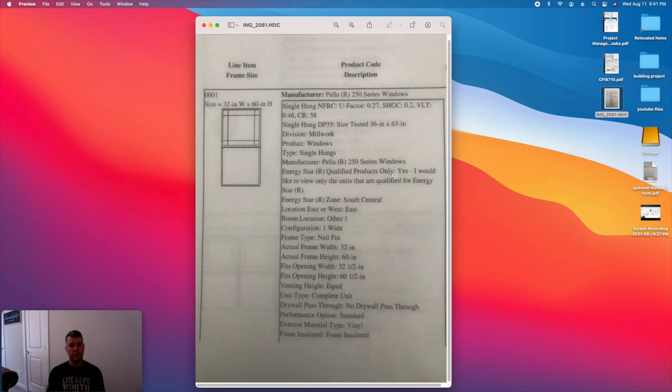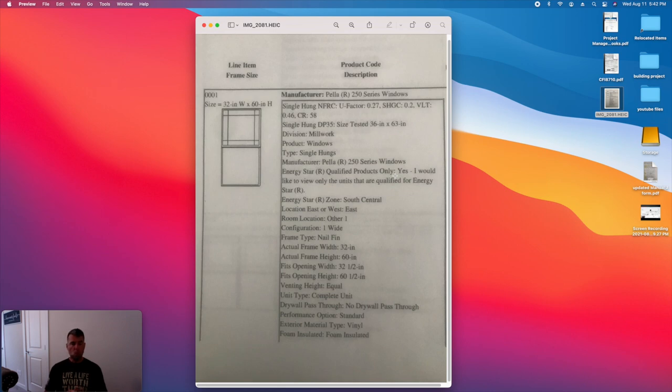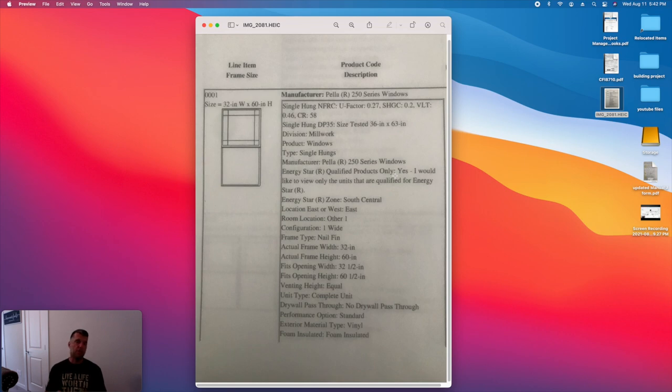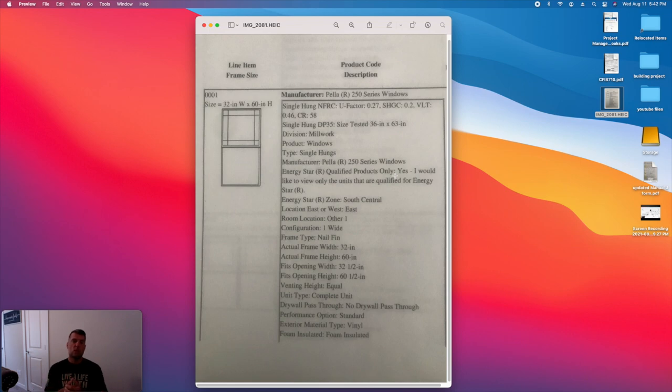Before I leave you guys to go, I'd like to talk about one other thing, and that is the supply chain issues with construction. If you've been considering building a home or remodeling or anything in the construction industry, supply chains are just all wacky right now. So I'm going to tell you what Lowe's told us. They said that for Pella windows, for these specific windows, we're probably going to be about 8 to 10 weeks out for delivery. So by the time I order, I have a lead time of 8 to 10 weeks.